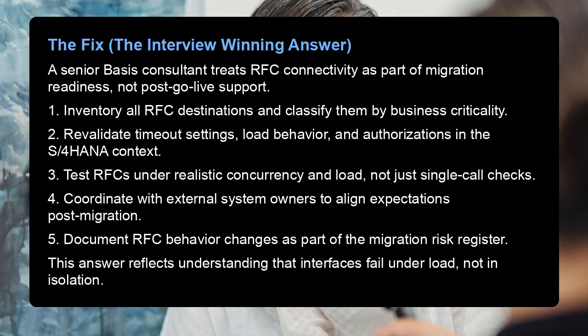The fix, the interview-winning answer. A senior basis consultant treats RFC connectivity as part of migration readiness, not post-go-live support. 1. Inventory all RFC destinations and classify them by business criticality. 2. Revalidate timeout settings, load behavior, and authorizations in the S/4HANA context. 3. Test RFCs under realistic concurrency and load, not just single-call checks. 4. Coordinate with external system owners to align expectations post-migration. 5. Document RFC behavior changes as part of the migration risk register.